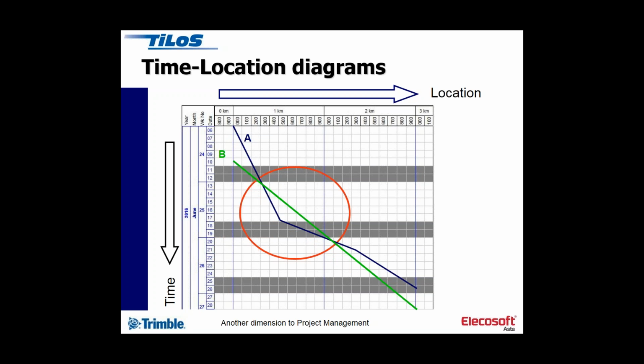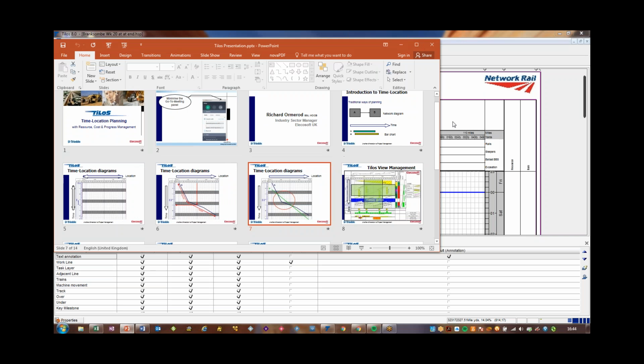And of course, the absolute killer for rail possessions is the train and the wagon sitting on the adjacent line, and that's got to move off before the next one can come in. And you know the length of that train, and that headway that people call it is a vital piece of information.